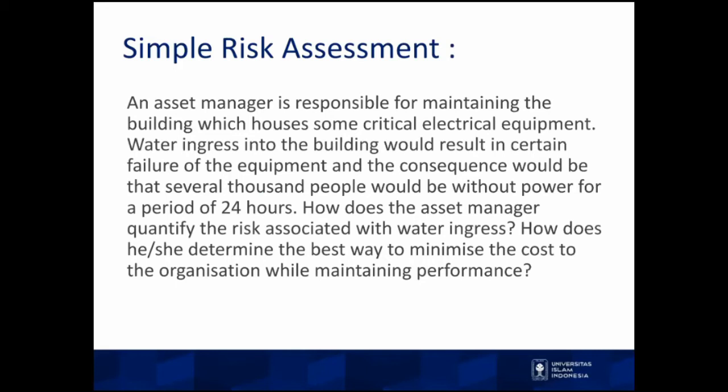For example, an asset manager is responsible for maintaining a building, which houses some critical electrical equipment. If water ingresses into the building, it will result in certain failure of the equipment, and the consequence will be that several thousand people will be without power for about 24 hours.